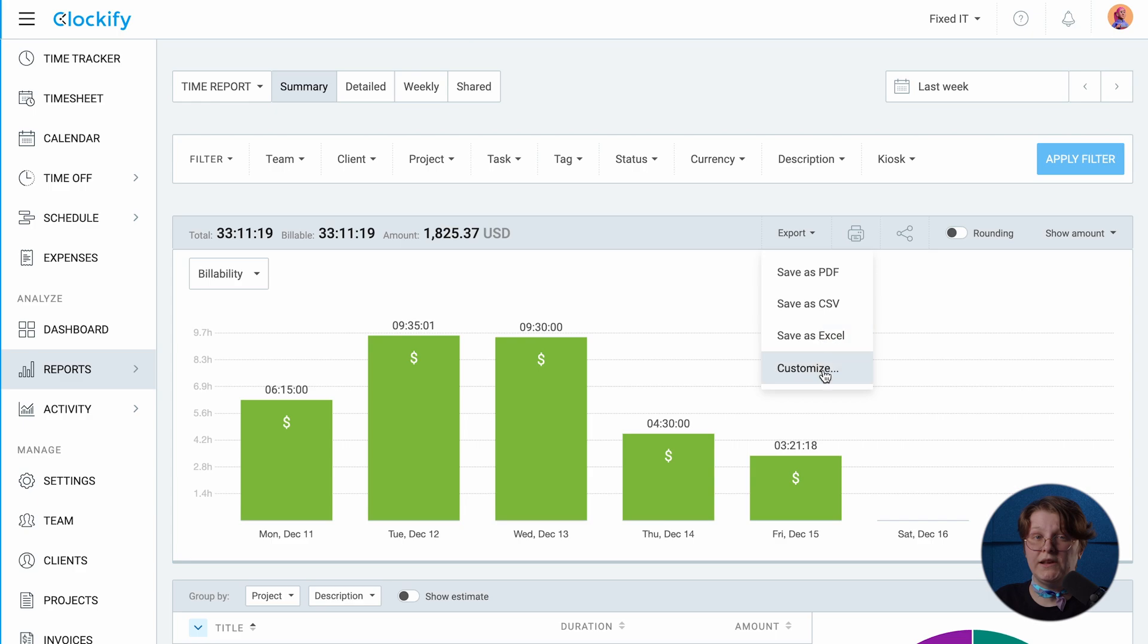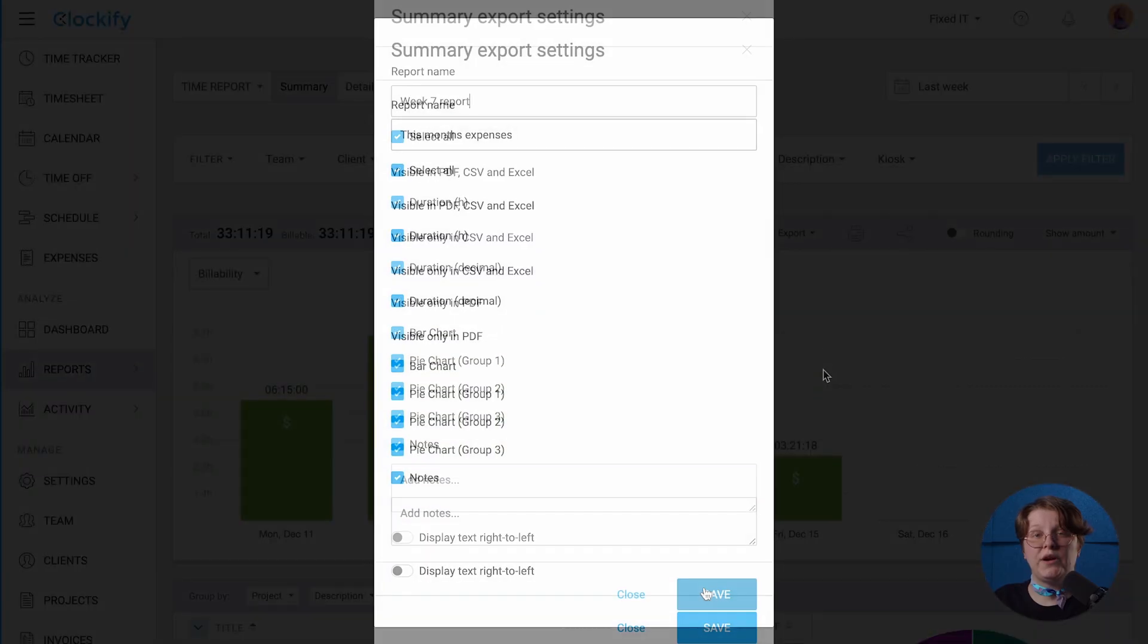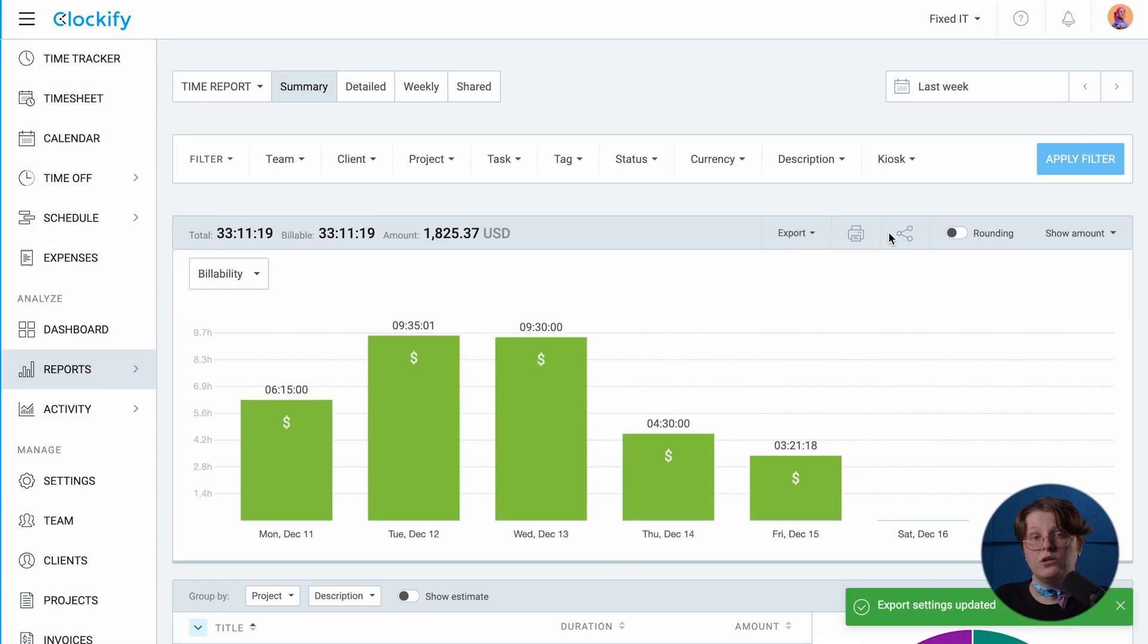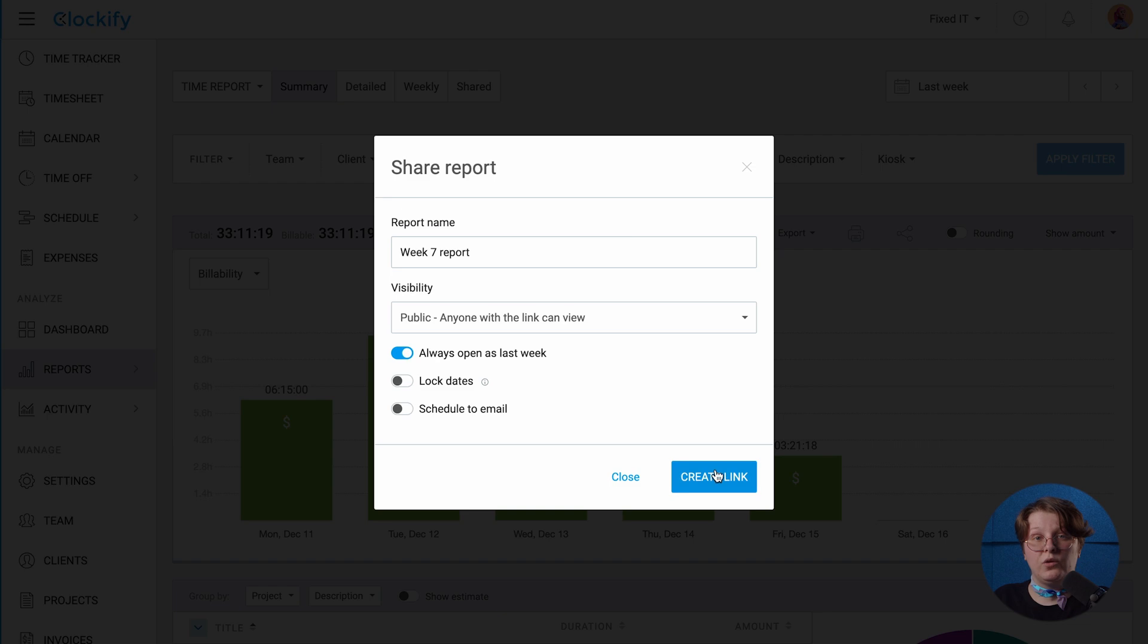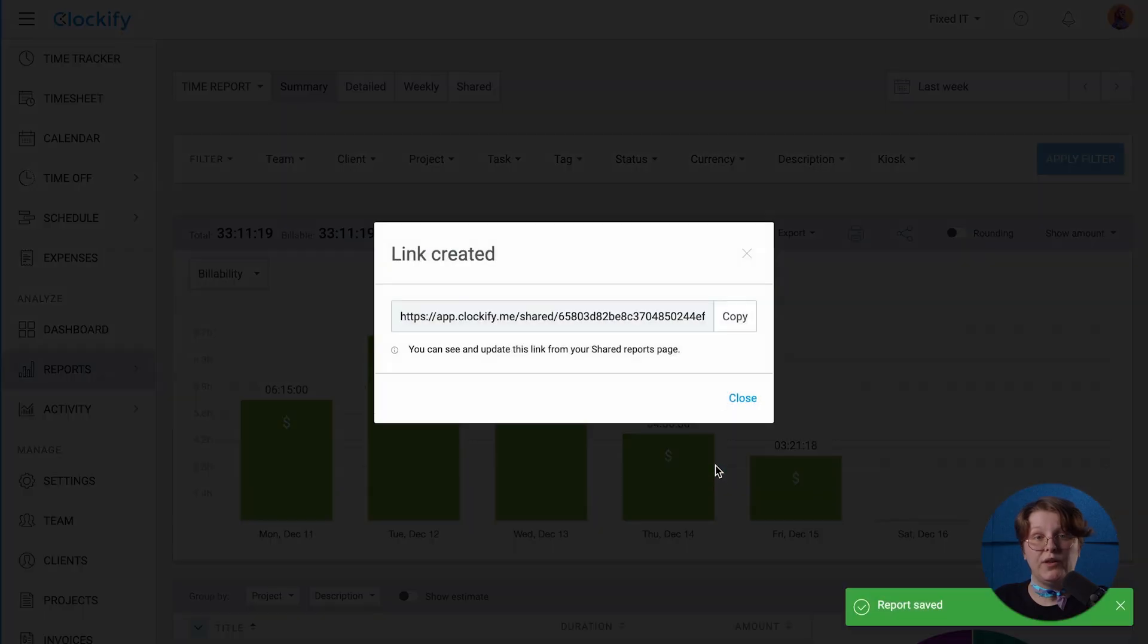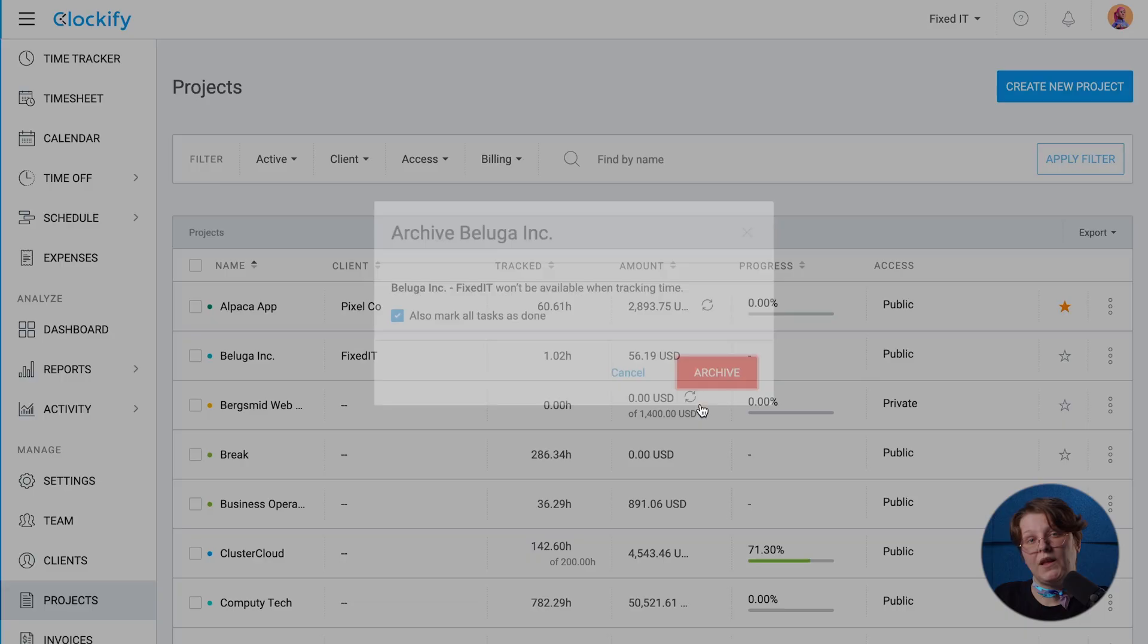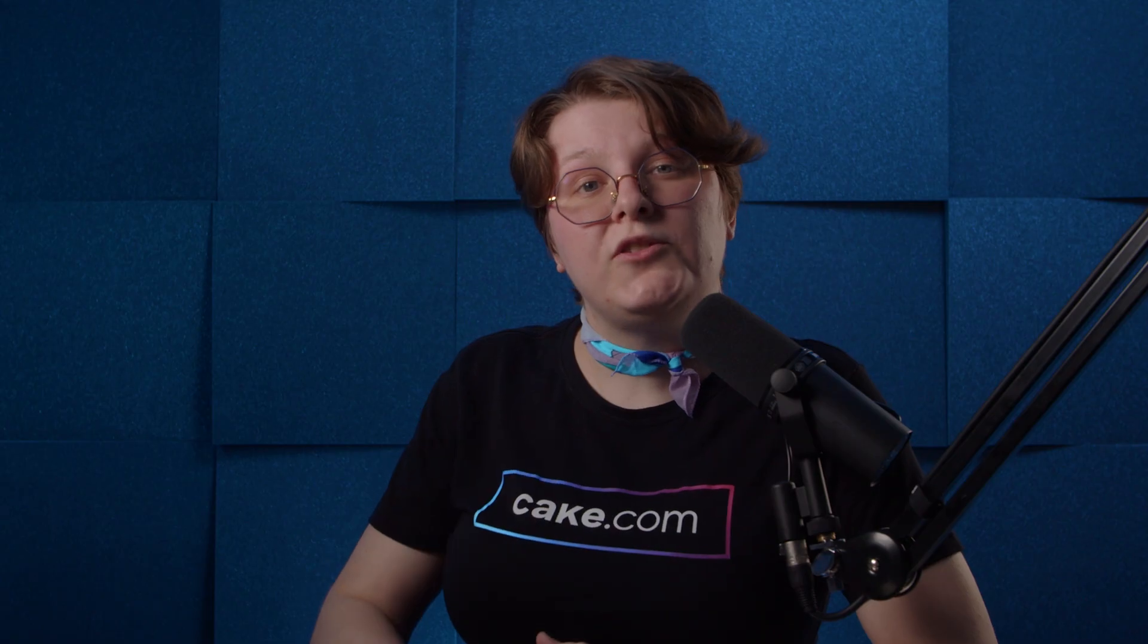Finally, you can export any report as a PDF or Excel, or share it with anyone via a link so they can see progress in real time. And finally, once all your Plakie tasks are done, you can archive that project in Clockify to mark it as done. You'll still be able to see tracked data in reports for that project.